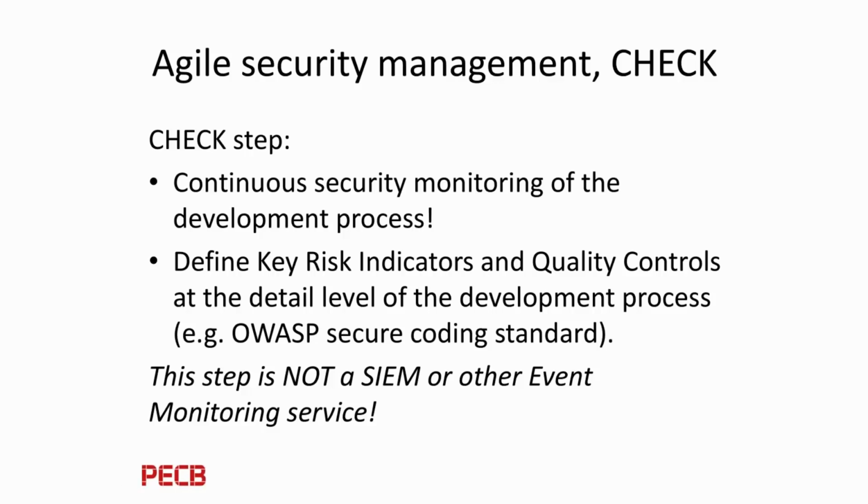In my company, it takes about 2 or 3 weeks to plan a penetration test, and that's exactly the cycle of a sprint. So you don't know in advance what is ready at that moment to be tested, and there's also no moment that the application is frozen and that there is time for a penetration test of several days and then time for the reporting, etc.